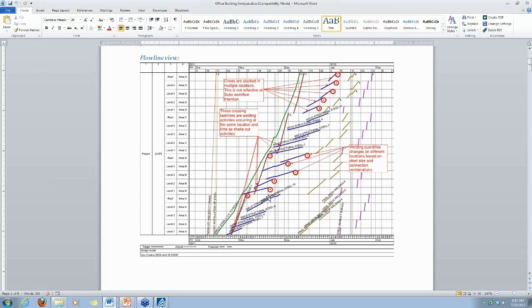It resulted in very different quantities from location to location. And when we align those dates to the CPM schedule, schedule planner is telling us, okay, well, you're going to need some more guys here, or you're going to need less guys here in order to achieve this duration.